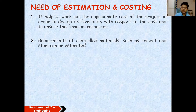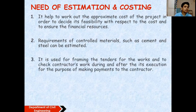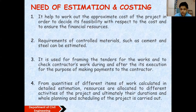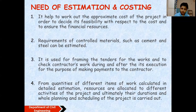If we don't know what quantity of materials will be required, we can't proceed. For payment to the contractors, we have to formulate the tender and pay the contractor a certain amount based on the total estimated cost. We also want to check the quality and progress of construction item by item — for example, in the foundation, we check whether the estimated amount of materials has actually been used. Similarly for tie beams and columns, we verify that the estimated quantities are being properly used.